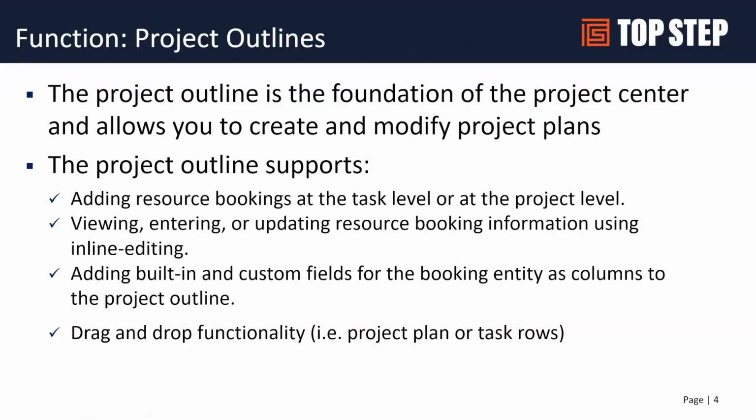Before we get too much into the Project Center, it's important to understand the importance of the project outline's work breakdown structure. It drives the foundation of the Project Center. The Project Center really sits on your work breakdown structure, your task structure, phases as needed. And it really is important to how you manage the Project Center. So be aware of certain decisions you'll have to make. Like, for example, the Project Center will allow you to do bookings at a task level or at a project level, or you can do either with the Project Center.